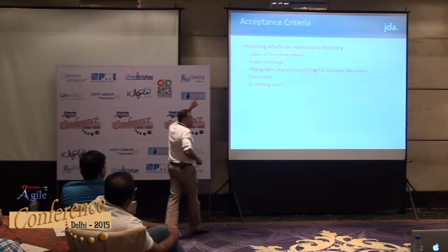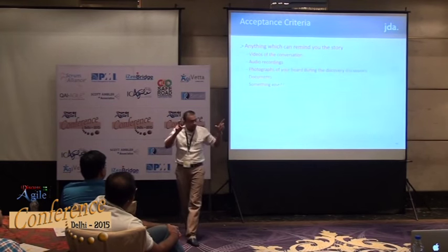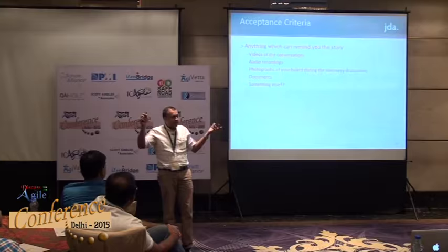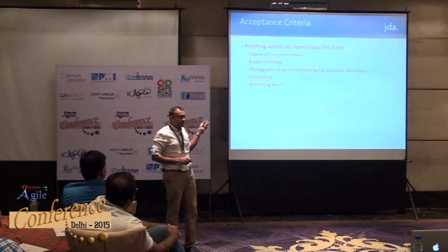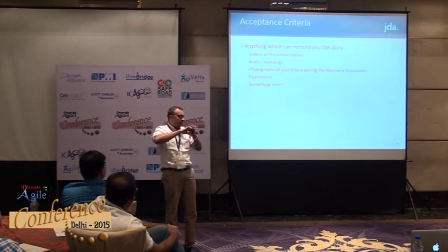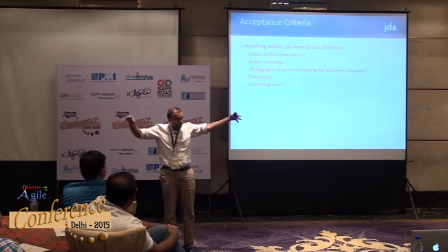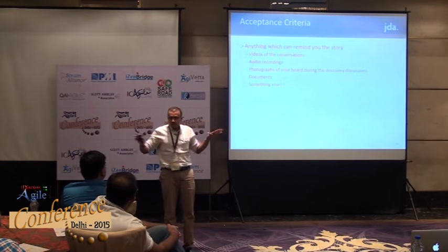It can be anything. It can be a video of your conversation. It can be an audio. It can be a photograph of your board design, what you have done while you are having the discussion. It need not be that you have to write in a specific format to identify that it's acceptance criteria. It can be anything which is connecting back to the story, and once the people who are involved could connect to the story, that's when we say you have a product backlog ready with proper acceptance criteria. The idea here is to create a backlog with shared understanding.